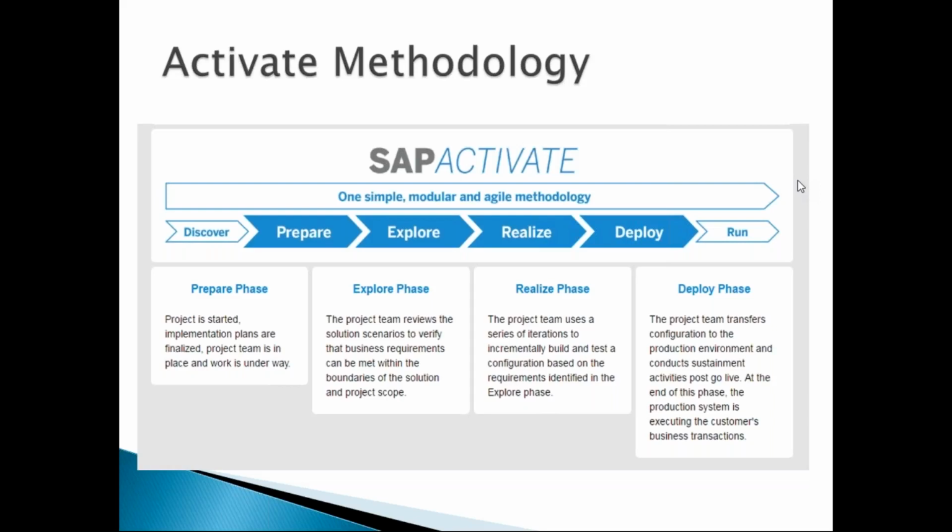So Suresh, just a question, on an average, for all the projects, module wise, how much time does it take to implement? So for end to end talent, on an average, it takes between 16 to 20 weeks max for talent modules. But if it is Employee Central in place, definitely minimum we plan it from 18 to 24. Or if it is more complex, there are instances where we even run for 28 weeks kind of. So completely you can take like SuccessFactors implementations will go around 6 months. If it is Employee Central, max 8 months. That's it.